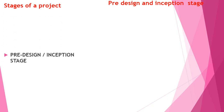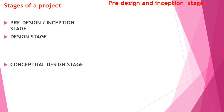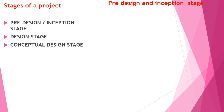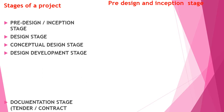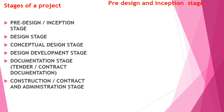The stages of a project are: pre-design and inception stage, design stage, conceptual design stage, design development stage, documentation stage such as tender and contract documentation, and construction contract and administration stage.